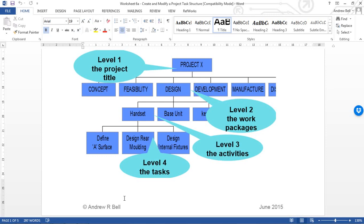In this example, I've got a project called Project X. This is the top level of the project, level one, the project title. I've decided to break this project down into different work packages: Concept, Feasibility, Design, Development, Manufacture.